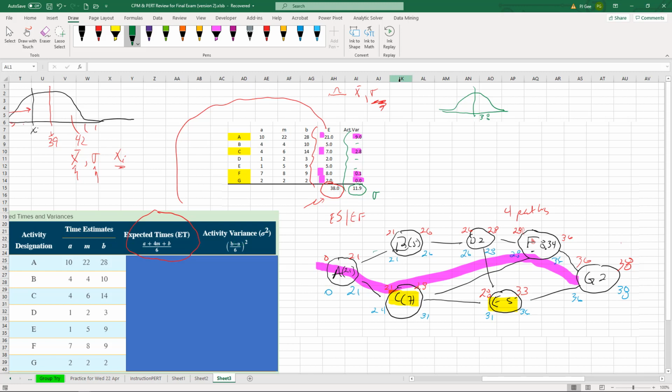All right. So who's going to guess what to do with the variance to get to the standard deviation? Well, of course, you're going to take the square root. It's telling us to do that, right? So we get our standard deviation. Yay. Okay, so there's a standard deviation. 1, 2, and 3 out. Get used to writing that out there because we're just making that a standard approach to this. We can rely on our knowledge of the empirical model here. Okay. All right. Boom. We've got everything we need. 38 comma, standard deviation is, hey, let's calculate it.